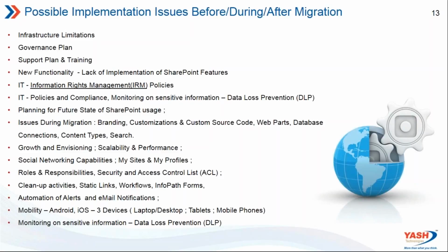And the most important thing that we plan ahead of migration is, do we need cleanup activities? Do we want to carry forward all the data which is unused for a longer time? We can configure those rules in IRM as well, saying that if any orphaned sites are there, or any data which is not used or accessed for a couple of years, we can track all these with PowerShell scripting written on top of the existing SharePoint 2007 or 2010 system, and make sure that these are all cleaned up before migration happens.